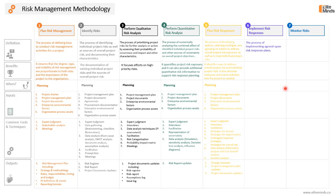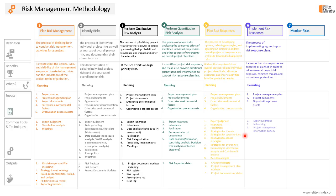Once we have the agreed-upon risk response plans, we can start the execution and implementation of those risk responses. It is the process of implementing agreed-upon risk response plans, ensuring that risk responses are executed as planned in order to address overall project risk exposure, minimize threats, and maximize opportunities. In this process, we simply execute what we planned in step five. It is part of the execution phase. Inputs include the project management plan, mainly the risk management plan, project documents like the lessons learned register, risk register, and risk report, and organizational process assets. Tools and techniques include expert judgment, influencing as an interpersonal skill, and the project management software or system used in the project. Key outputs will be change requests and updates to project documents like the issue log, lessons learned register, risk register, and risk report.